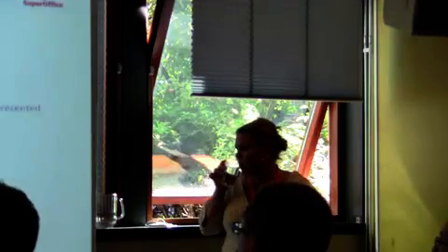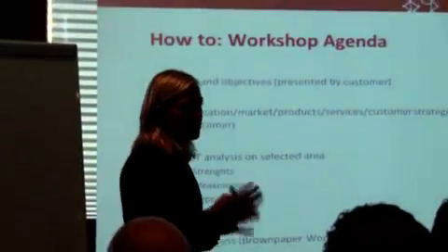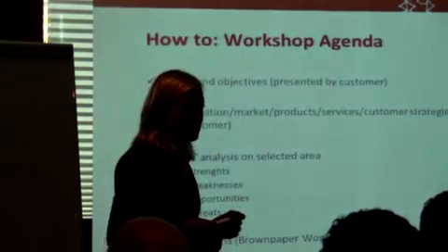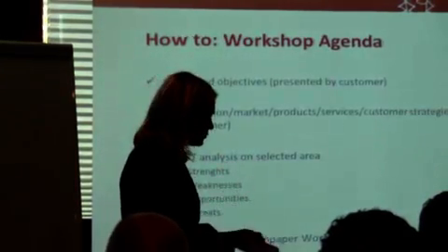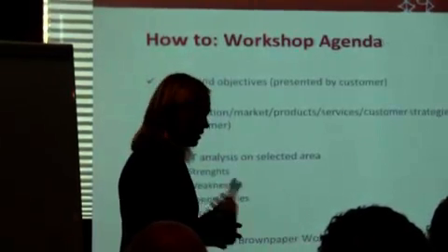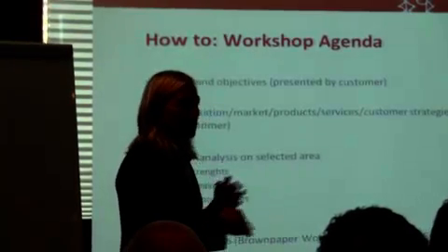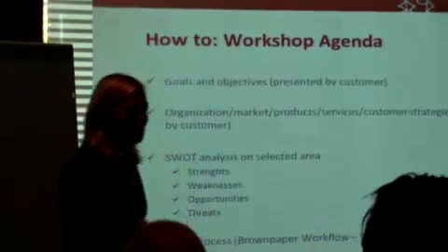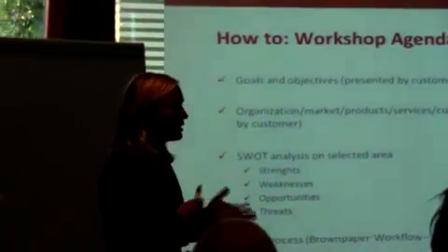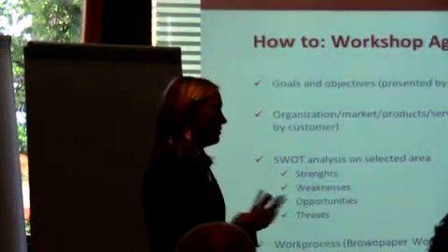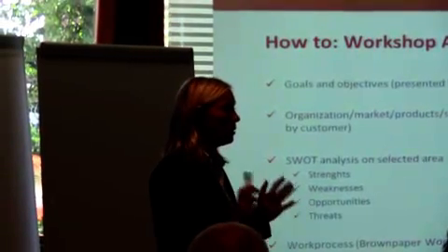And I think it's also important, because you have to discuss together with the customer, that you prepare this activity together. At that point, it's also necessary to discuss what should be prepared, what people should be present, why this person should be there, that person should be the one deciding upon this and this, and that he needs to prepare these questions. You need to be in agreement, and also in agreement on who distributes this information to the participants, because that's maybe not always clear. Is it us or is it their project manager? You just need to communicate.